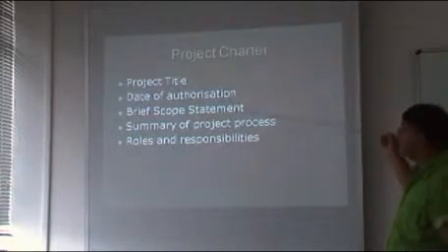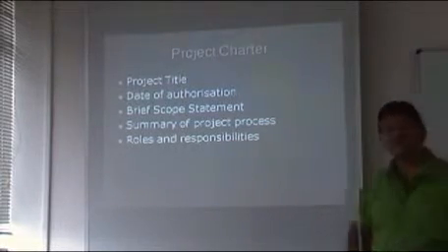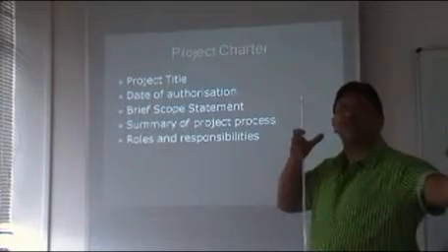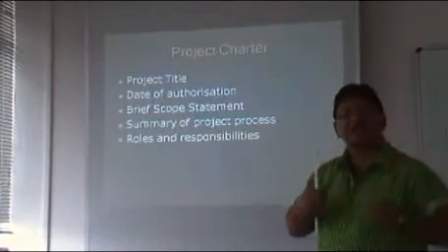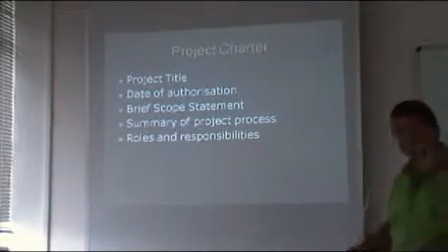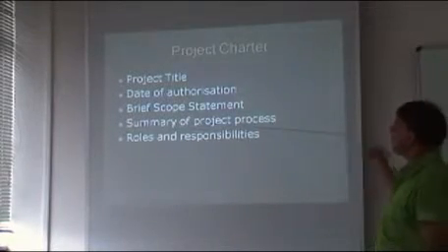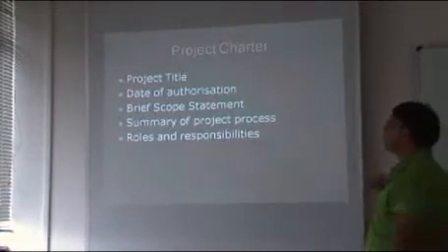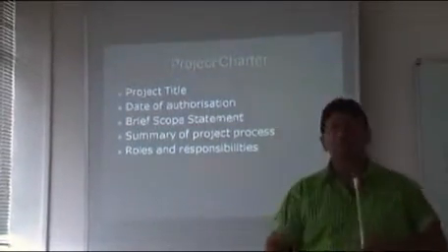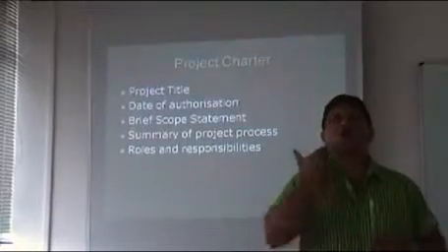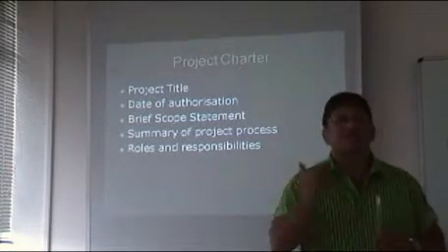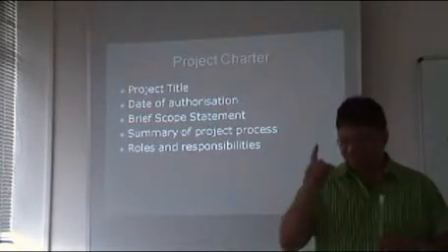Have a look at this brief scope statement inside of the project charter. In the charter, the scope is not discussed in detail. It is mentioned briefly inside of the charter what needs to be done, what must be done. Then there's a summary of project processes and the roles and responsibilities, basic components of the project charter. You cannot embark on a scope management exercise if you did not have a signed project charter for the project. Very important.